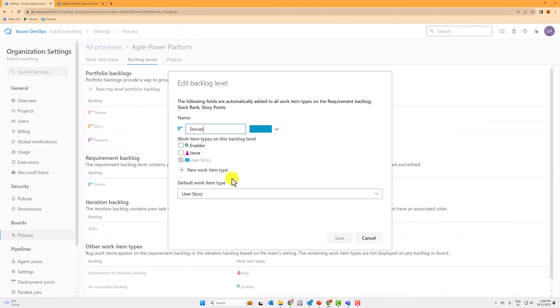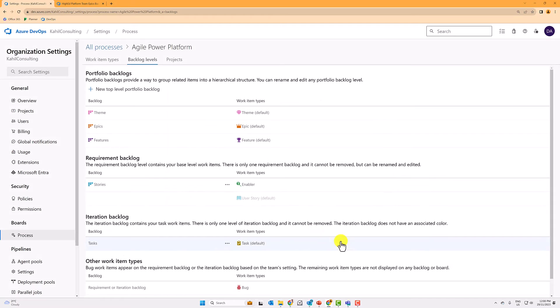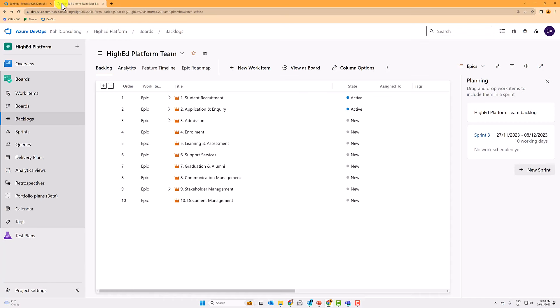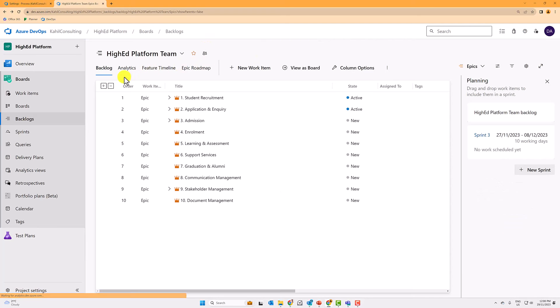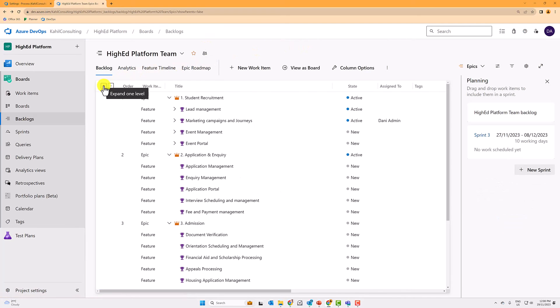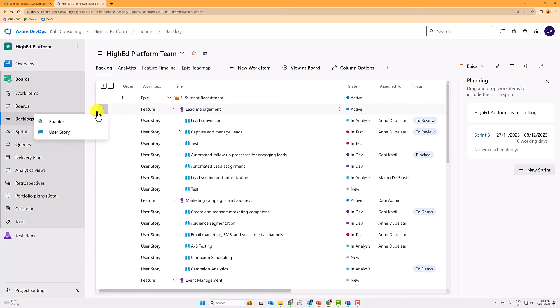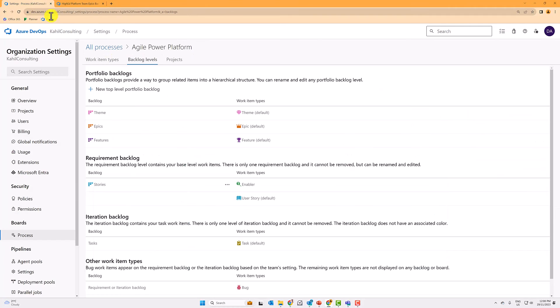if I edit and I select work item types on this product backlog level, if I select also enablers, which is that other work item types, if I go back to my product backlog, refresh my screen, I can effectively from a feature now, I can have a choice to create a user story or an enabler. So this is how the backlog levels are tied to your product backlogs as well.